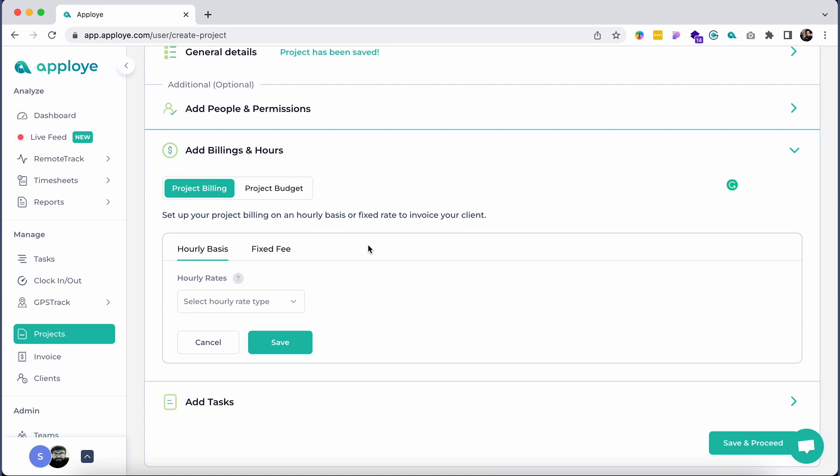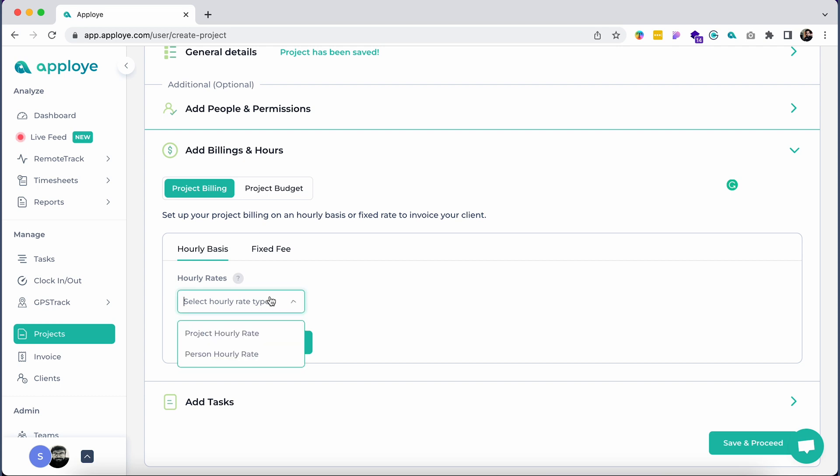Project Billing is for billing your client. You can use this feature to bill your client in the future. You can bill your client on an hourly basis and fixed rate basis. If you choose to bill clients on an hourly rate, you will have two options.